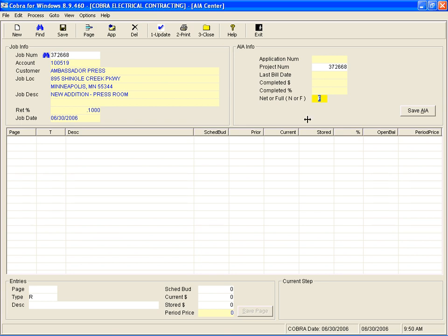Again, this is coming off of your defaults. And again, the difference is that with full retainage, the retainage is billed out with each bill, although you're expecting back less the retained balance. And then net retainage is different in that you're going to be sending out a separate invoice, not application, but invoice, for the amount of retainage that has been withheld as the job is in progress.